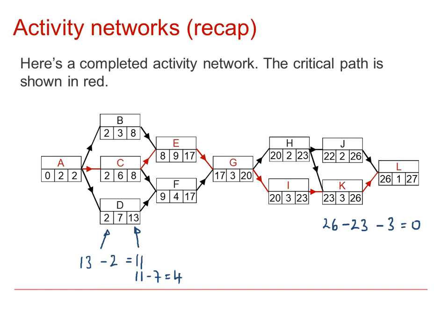The importance of the critical path is that those activities can't be delayed, or at least if they are delayed then the whole project will be delayed by the same amount. However, the other activities, what are called the non-critical activities, can be moved around within their range of values. So as long as they aren't starting until their earliest start time and they're completed by the latest finishing time, then the actual activity itself can be put at a different position.